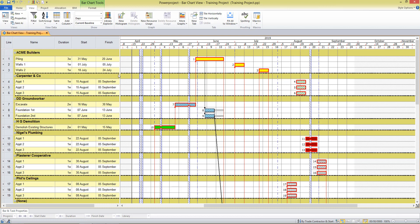These dotted lines represent page breaks, so when it comes to printing we can choose to scale the printout and use the defined page breaks. We'd have one page for each of the different trades here, and that's a great way of just giving them a list of the work they need to do. Again, to remove the sort or to turn it off, we can click on the sort name in the bottom of the project screen.